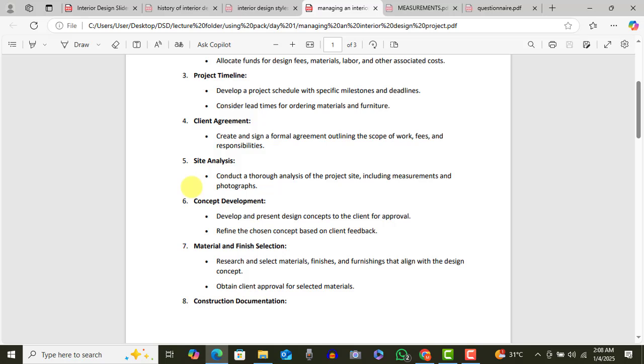Charlie. Or get a scaffold to do that. Yeah. So you really have to go and do a site analysis, because especially these new sites, sometimes roads have not been done, construction is still going on, and there's the type of soil that is there. Now you bring items there and you are stuck. Or even when you are doing analysis, you need to know, okay, if I bring this thing on this day or at this particular time, there may be some work going on that may even make the thing dirty.